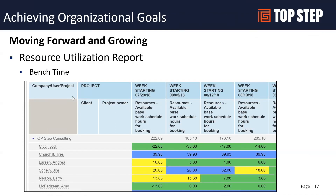Looking at bench time: there is a value called available schedule hours for bookings. Assuming people have a work schedule of 40 hours and they're booked for 25 hours, this value would return 15 hours available to be booked — showing how much availability or bench hours you have moving forward. If someone is overscheduled beyond 40 hours, you'll see a negative number. For example, Andrea has 10 available hours for bookings the week of July 29th, five the next week, and so on. A good way to see capacity across your team.